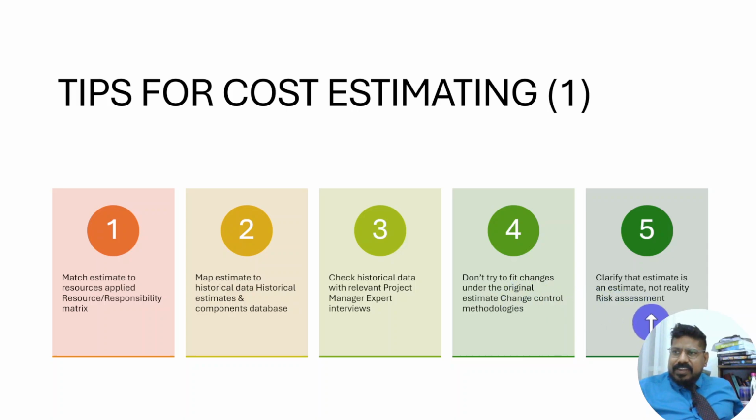Point number 5 is clarify that estimate is an estimate, not reality risk assessment. Yes, estimate is an estimate. When you are doing estimations, please mention that it is an estimate subject to a lot of conditions and is valid for the next 1 month or 2 months. It is not valid for, let's say, next year.